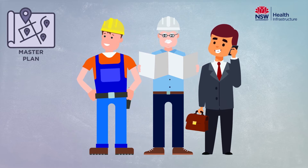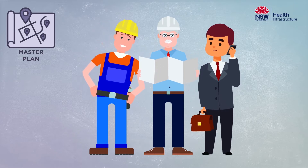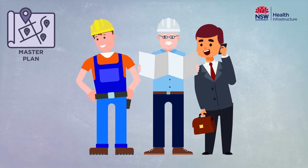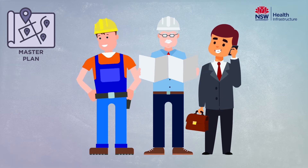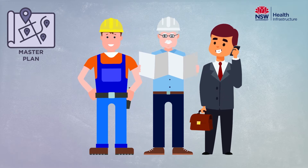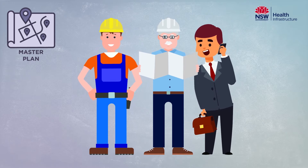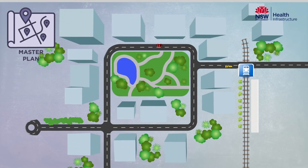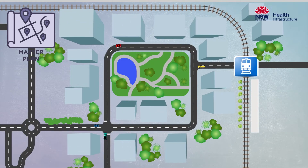we appoint a lead design team who develops a Master Plan for the hospital campus and considers the relationship with community-based services. The Master Plan looks at the entire campus, defining and identifying opportunities and constraints of the campus, including opportunities for future redevelopment zones.